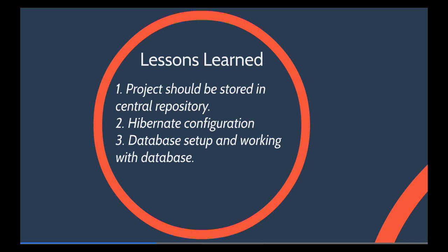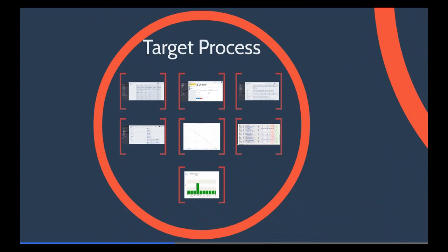We used Target Process as our project management tool. This consists of numerous features and it is a very user-friendly tool. The main criterion of the tool is that it can divide features into user stories, which are further divided into tasks. A collection of user stories can be shown in sprints, and a collection of sprints is shown in a release. We divided our project into 3 sprints and 1 release. Some of the views and reports of Target Process are shown now.